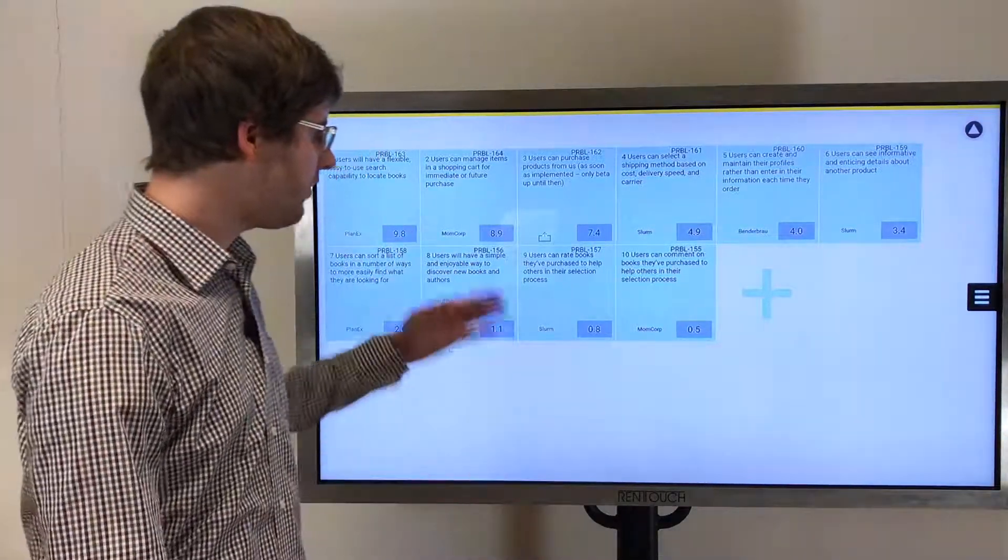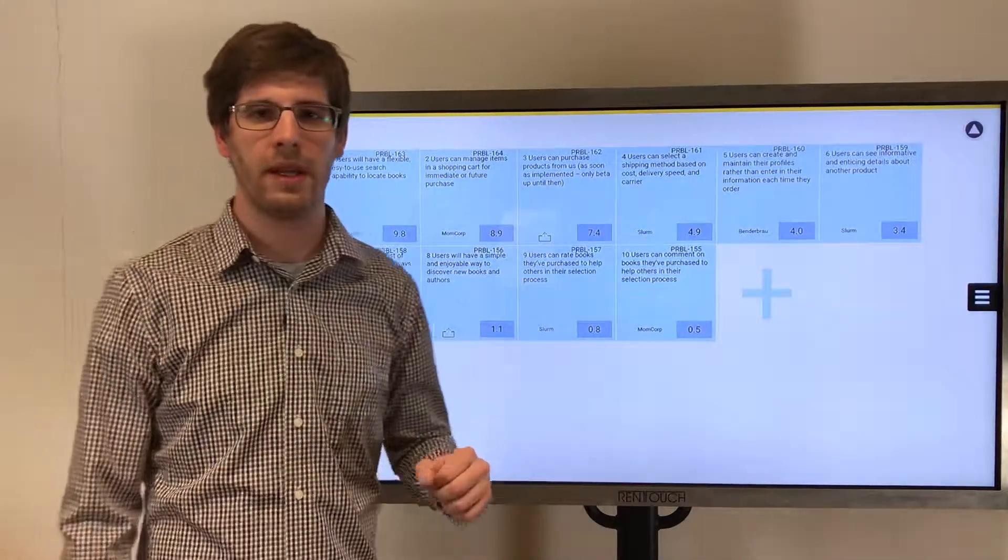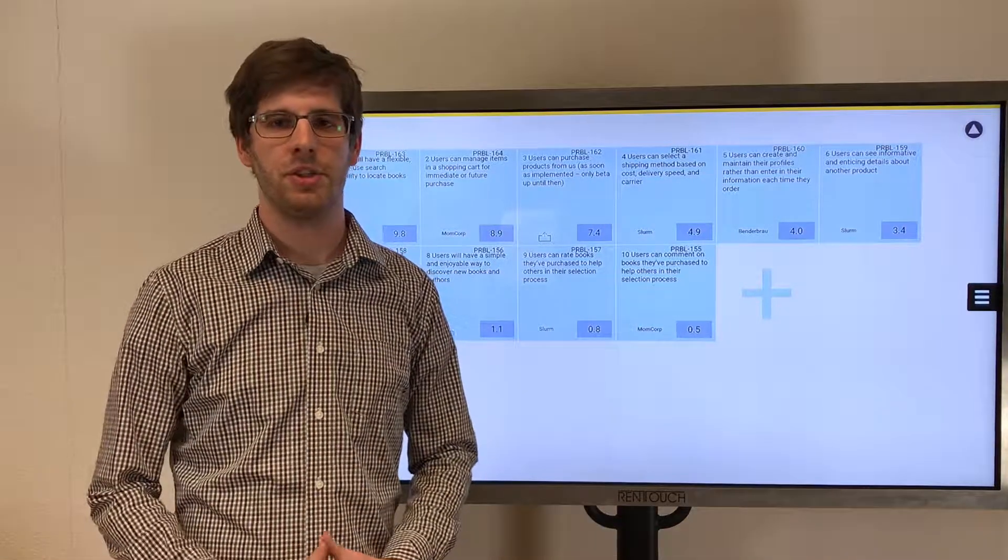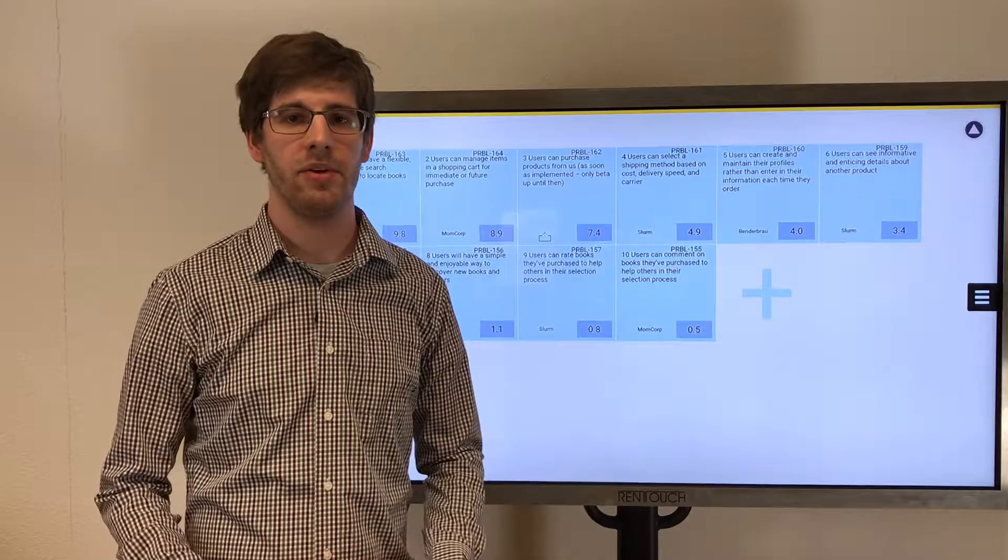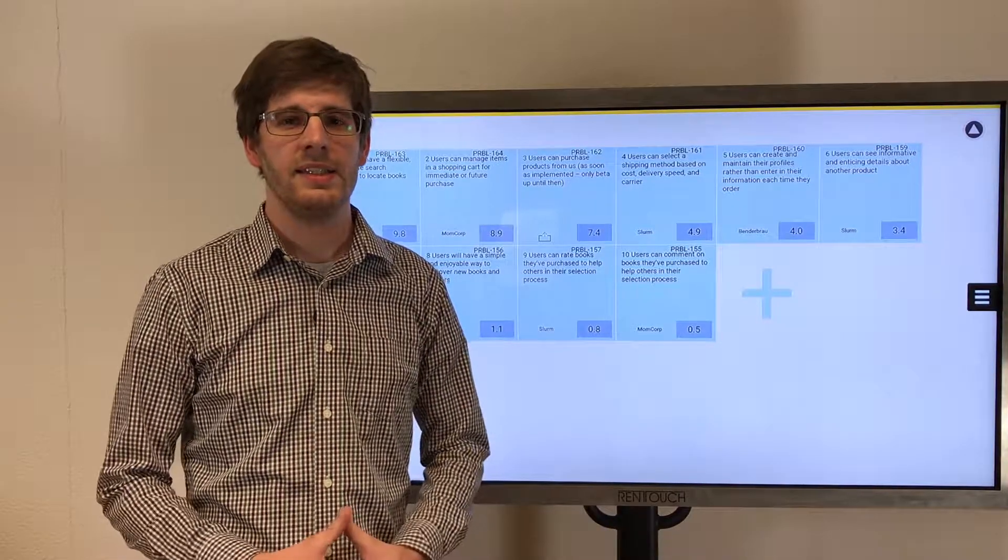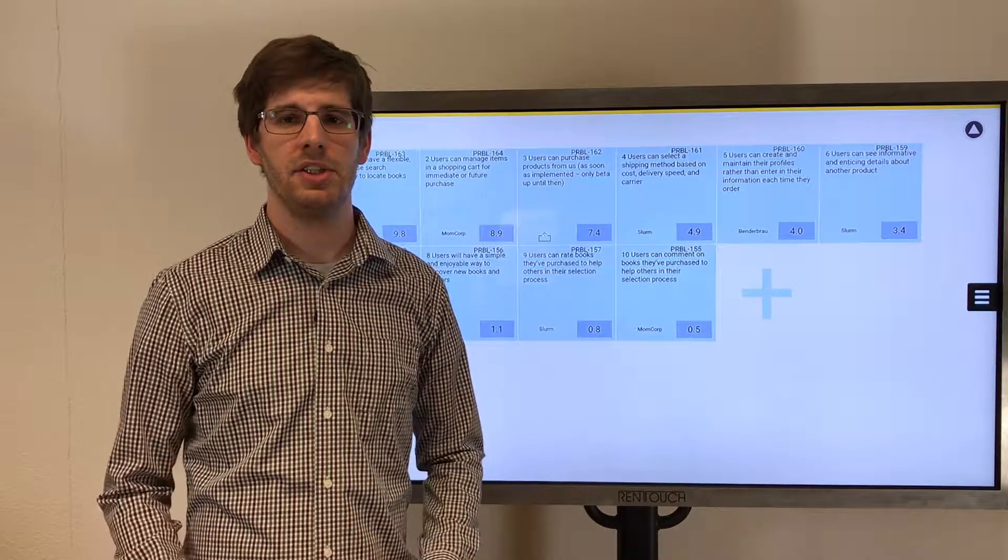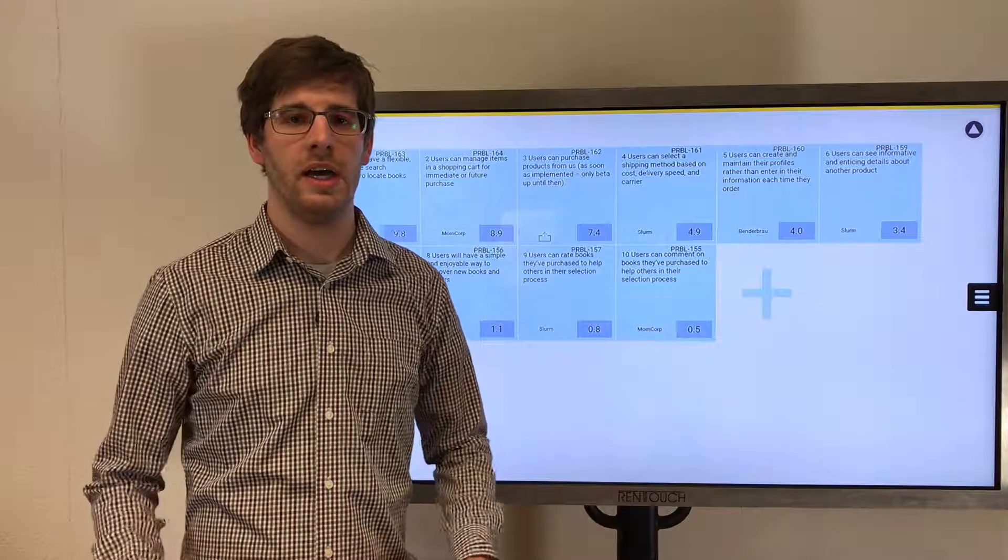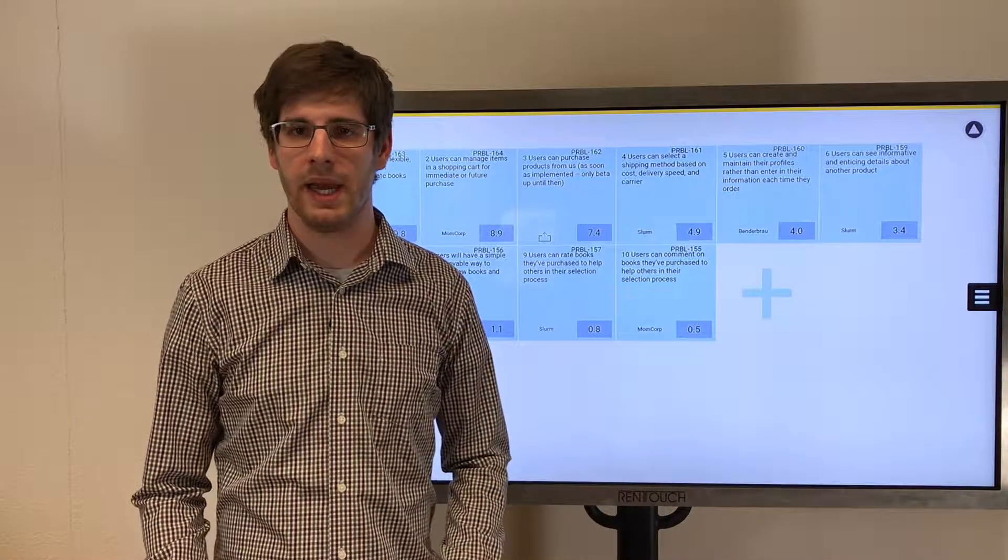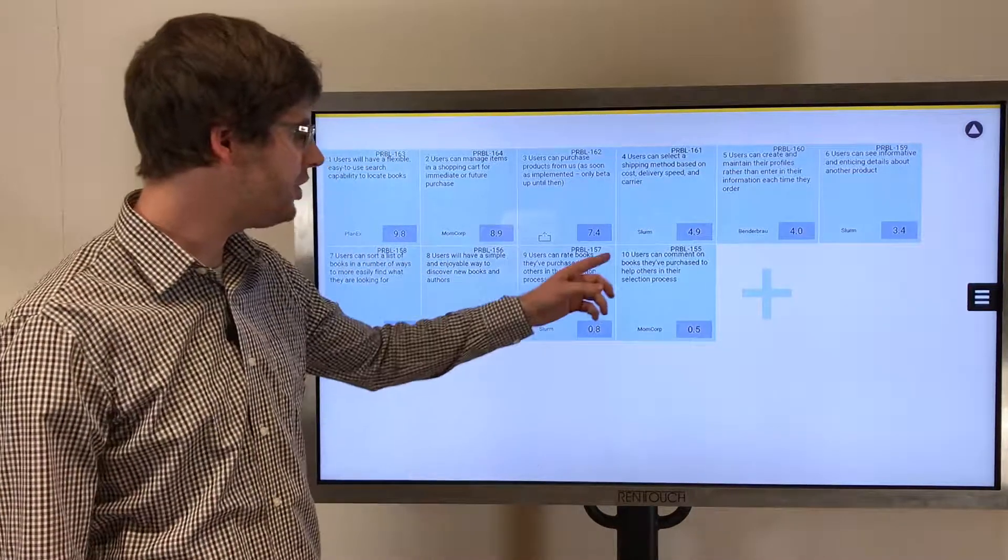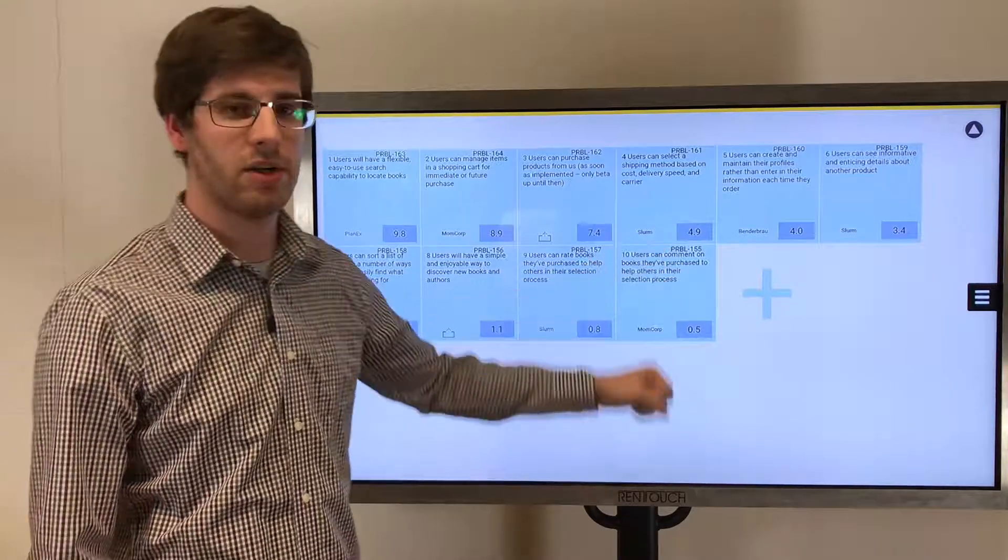We start from the top on the Program Backlog board, where you manage the top 10 features ranked by the WSJF value. In this case, the features were created in JIRA and synchronized with the PI planning app. You can tell by the JIRA issue key in the upper right corner.